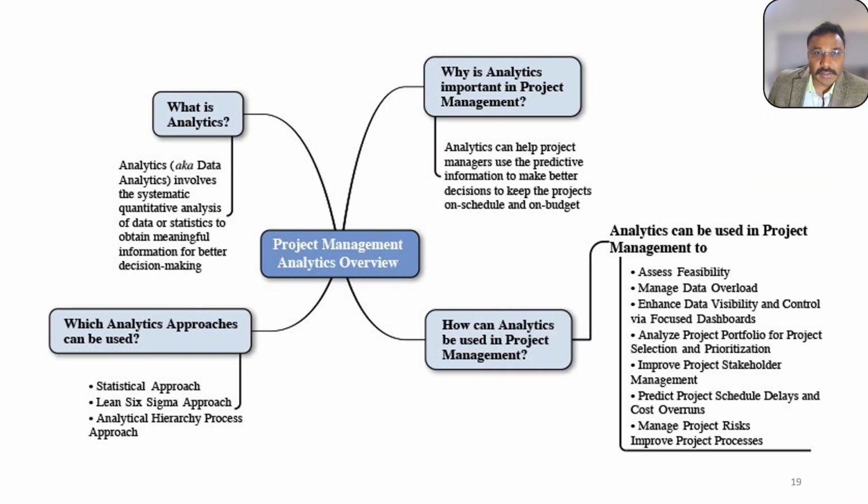You see this visual here. It shows the journey from origin and planning to today's actual performance and into revised future forecast. Projects rarely follow the original plan. Analytics allows us to compare plan versus actual performance and forecast accordingly. This continuous feedback loop is central to effective project control.